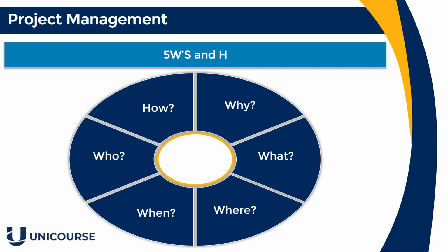But Raki looks at who's responsible for each task, who's accountable, who needs to be consulted, and who needs to be informed. Now, if there were any problems relating to task allocation, you could bring it right back to that, and maybe for the next project you can change who was responsible or accountable for each task. Always focusing as well on the deliverables. You could specifically use this model and this technique to look at how every objective went, basically.